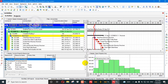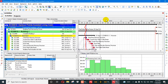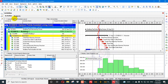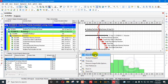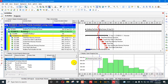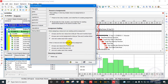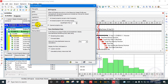We want to see whether all these project resources are assigned to other projects or not. We will click on 'Show All Projects.' However, it is not showing all projects because we need to go into user preferences, then resource analysis, and select all closed projects except what-if projects. What-if projects will not be included in all closed projects.